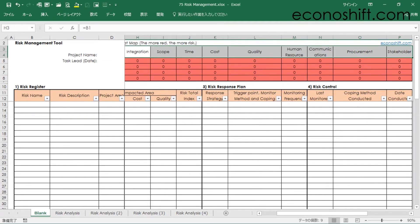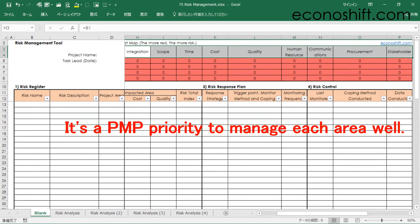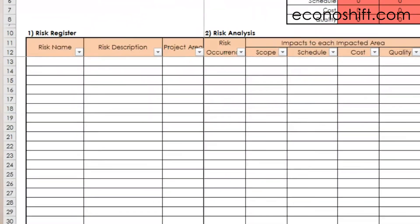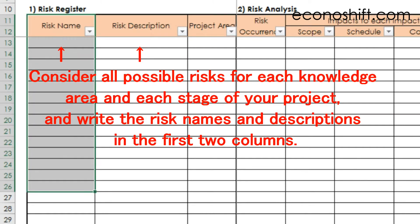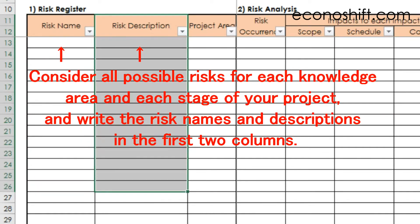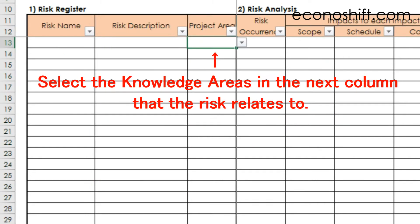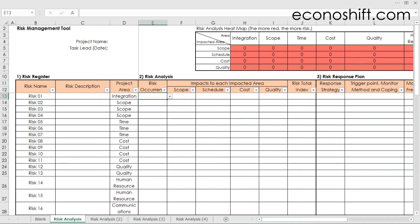The nine areas are: integration, scope, time, cost, quality, human resources, communications, procurement, and stakeholders. It's a PMP priority to manage each area well. Then, by referring to your project document, consider all possible risks for each knowledge area and each stage of your project, and write the risk names and descriptions in the first two columns. Then select the knowledge areas in the next column that the risk relates to. Up to this point is risk registration.